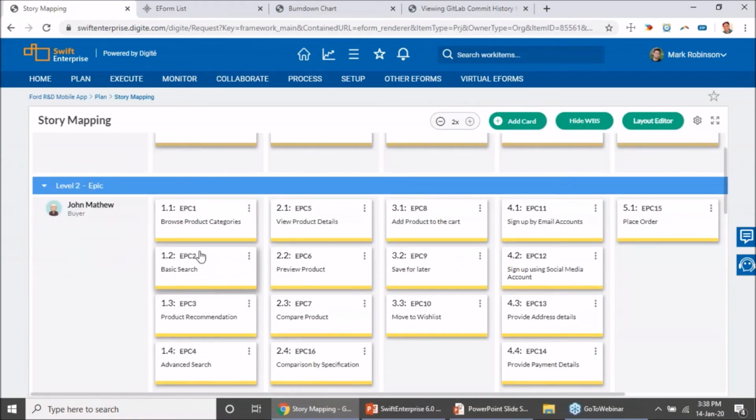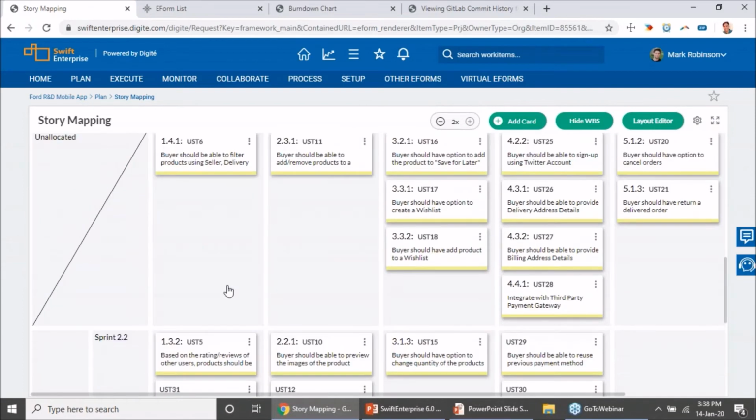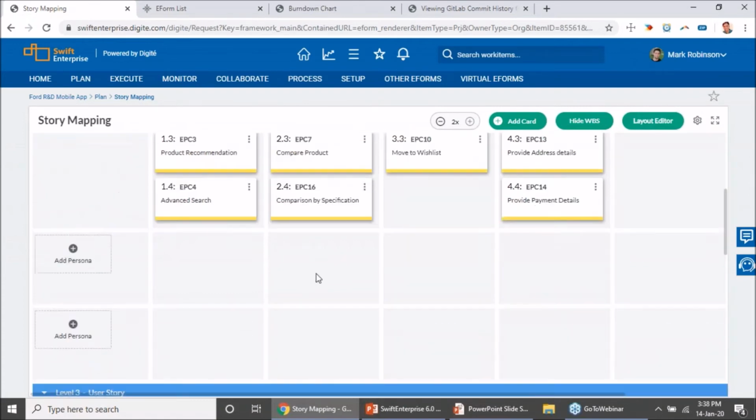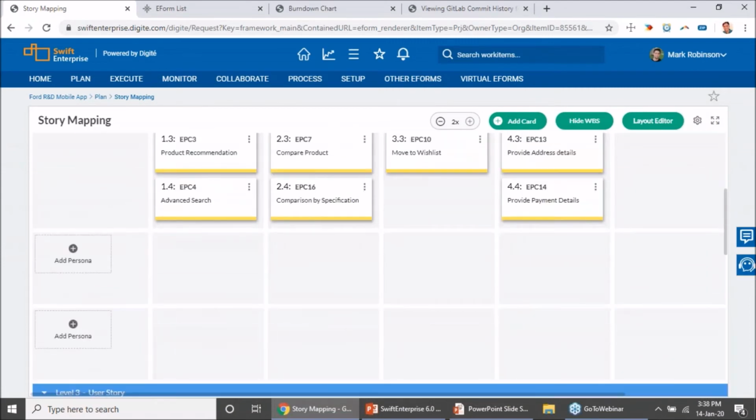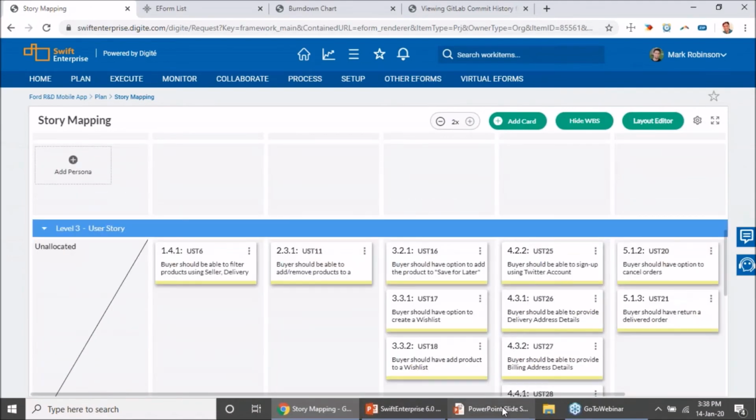So first, I need to start building and take up as many user stories which are pending on the left hand side, and then once I have the minimum amount of functionality present to make the next step of functionalities work, I should move ahead on the right hand side of the sequence. So that is the visual story mapping board for you.